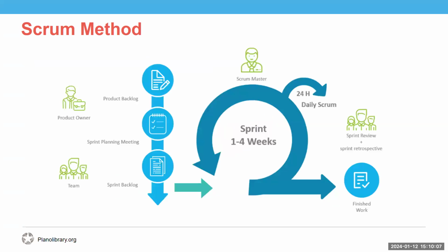So with Scrum, work is split into short cycles known as sprints, which are these little circles over here. This allows for frequent status updates and project adjustments. Work is taken from the backlog for each sprint iteration. You can see the top blue circle where it says product backlog. And the small teams are led by the Scrum Master for the duration of the sprint, after which they review their performance in a sprint retrospective and make any necessary changes before starting the next sprint.